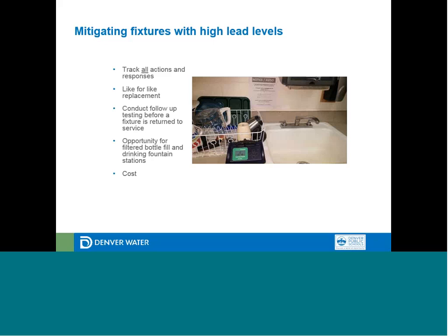As I mentioned, we're planning for the like-for-like replacement, and before we return a fixture back to service, we will need to conduct follow-up testing to deem that safe and confirm that the level has been reduced.